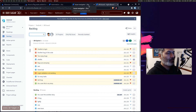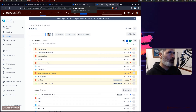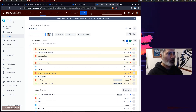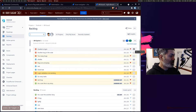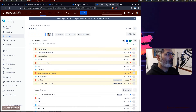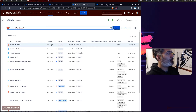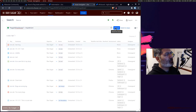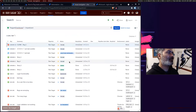This is a great way of doing simple automations to figure out what issues are added to sprints. One suggestion — or rather a question — is: this is great, I understand why someone wants automatic flagging of issues, because you may want to report. For reporting, you can do something like a JQL search with 'flagged = Impediment' and search. We can see here that we can separate these flagged issues later on.